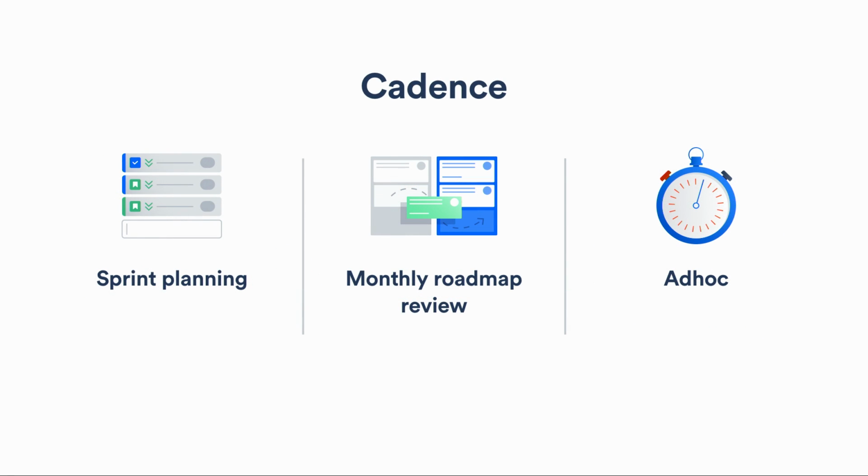So for us as a portfolio team, the cadence that we do this at is threefold. Firstly, we have a forcing function, which is sprint planning. Although it's very much focused on what's coming in the next 2 weeks, we're a Scrum team with 2-week iterations, it's a great way for us to get eyes over our plan and think about any new information that we have and feed that into our roadmap and make any tweaks to our roadmap and enter that data into portfolio to see what our roadmap will then look like.